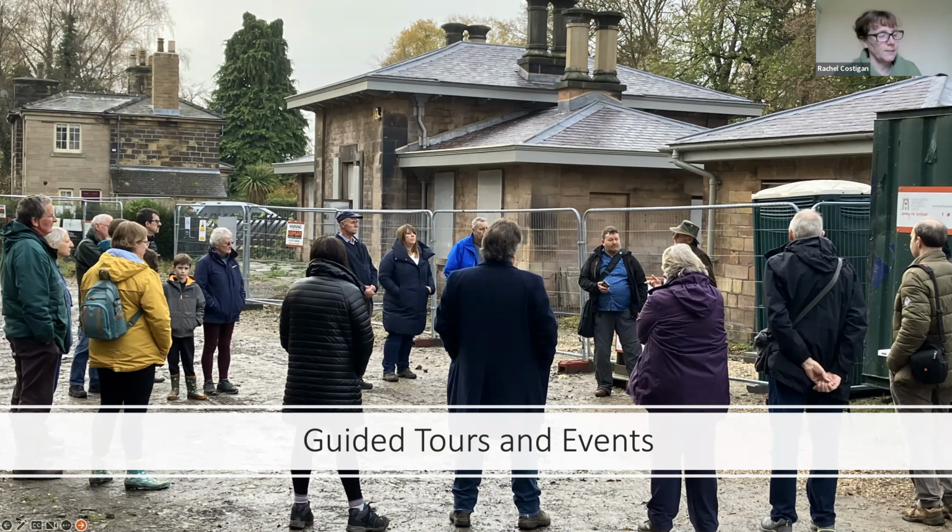We're just prioritising getting the history research and the ground maintenance off the ground, as they were quite time constrained in terms of working on the woodland site during the winter when the trees are dormant and there are no nesting birds, and the oral history and research, because we need a bit of lead-in time to get our panels printed and produced. So event support, that's going to be coming up in the spring. And we'd love your help with ideas and planning and being there to welcome visitors at the time when we're open and delivering those events.